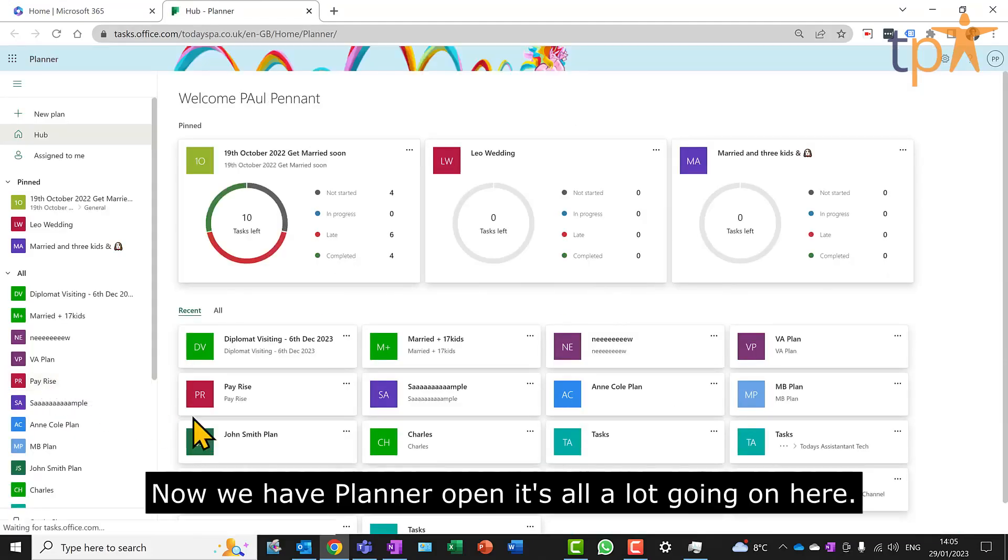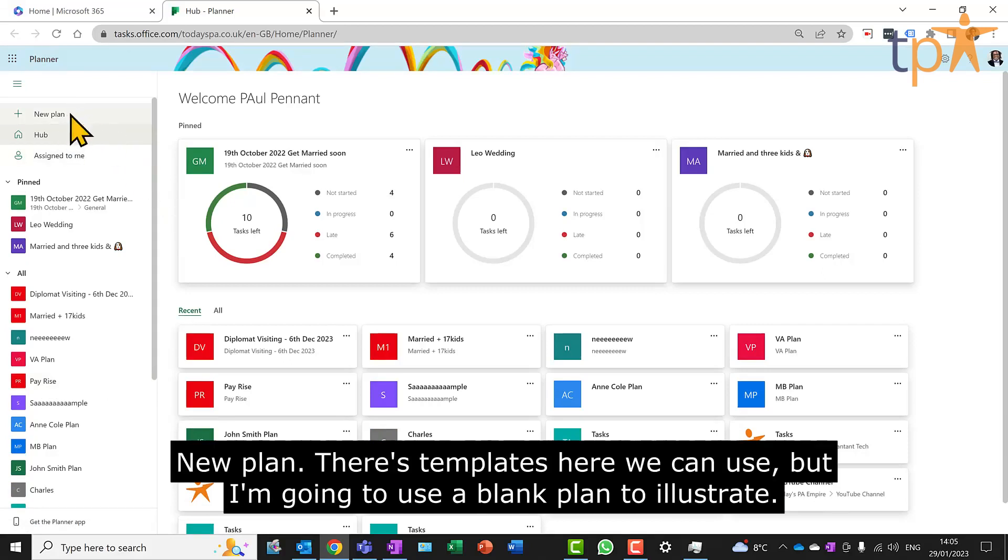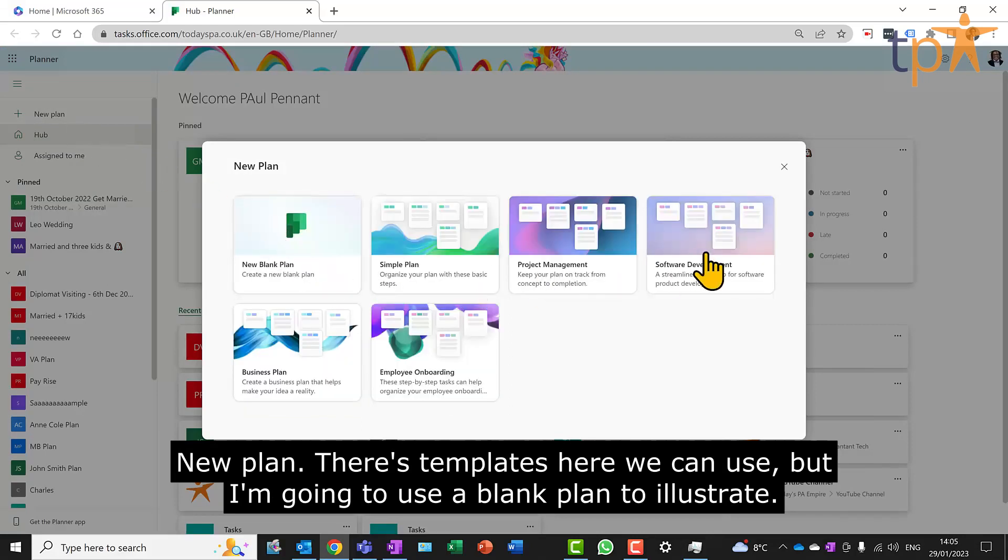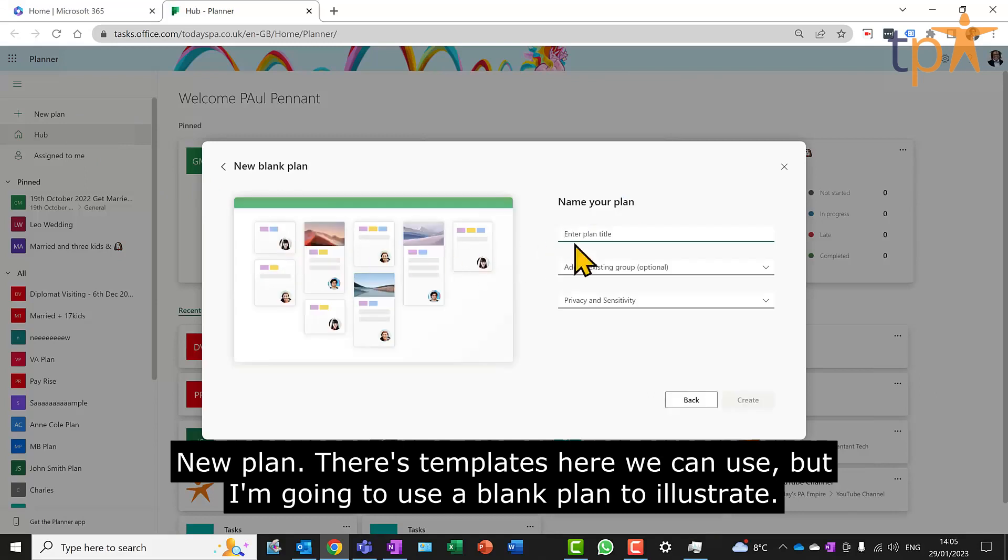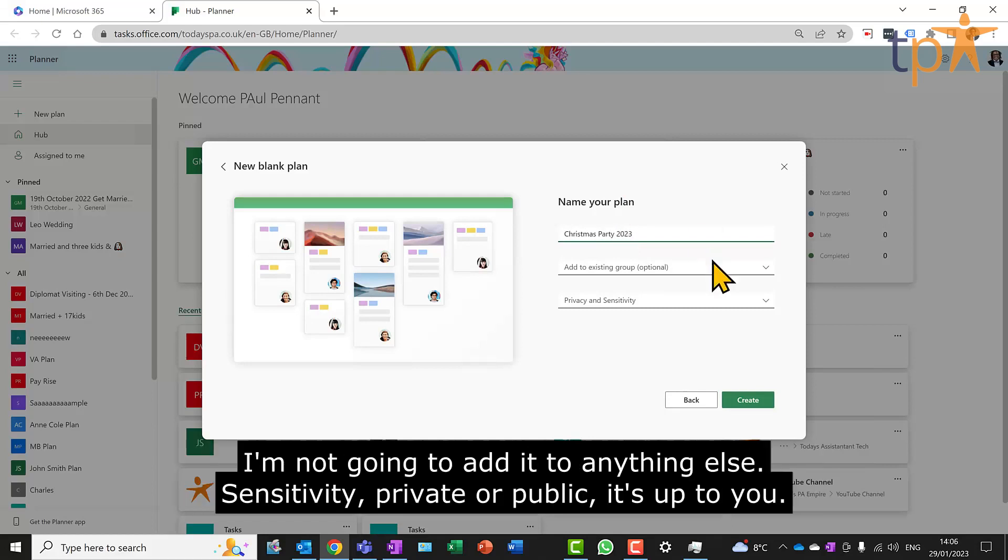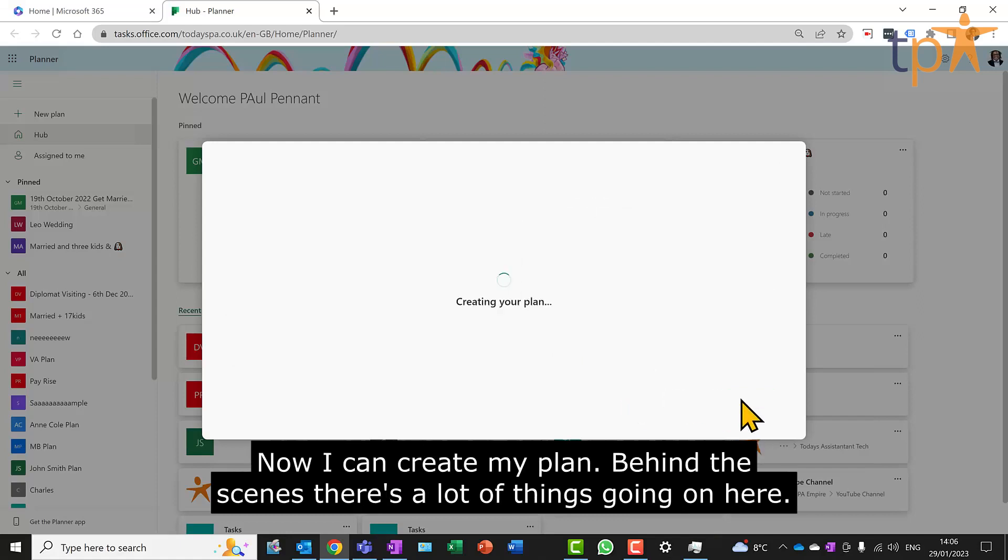Now we have Planner open. There's a lot going on here. I'm going to create a really simple plan for you to see what's happening. New plan. There's templates here we can use, but I'm going to use a blank plan to illustrate. Name my plan - it's never too early to do this - so I want to organize a Christmas party for 2023. I'm not going to add it to anything else. Sensitivity, private or public, it's up to you. Now I can create my plan.